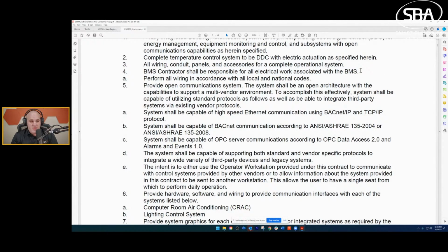So that one, right off the bat, you should wonder, okay, I see this, but then I also see that the electrical sub is responsible for VFDs. So you're starting to see the conflict there. This is an area where you'd have to ask yourself, do I RFI this? Do I just accept that in common sense land, this means obviously wiring up my controllers, wiring up my trunk, wiring up my IO? Or do you go and actually clarify this more?